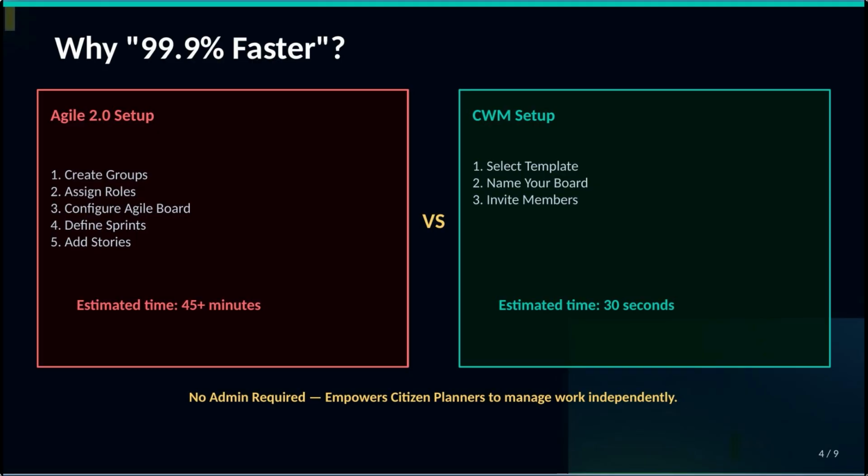It's an asset model, and then we have to set up the group. We have to give proper access to the scrum master, scrum owner, and then the scrum team. So many roles are involved, and then we have to set up the backlog, configure everything correctly, and then give access to the board. There are multiple configurations, so there was overhead. I did this manually for 2-3 projects, and it took more than 45 minutes, averagely 45 minutes.